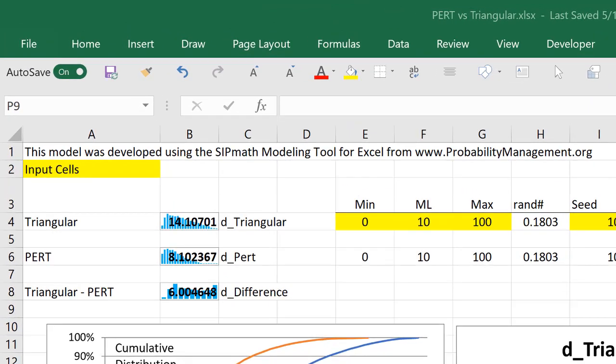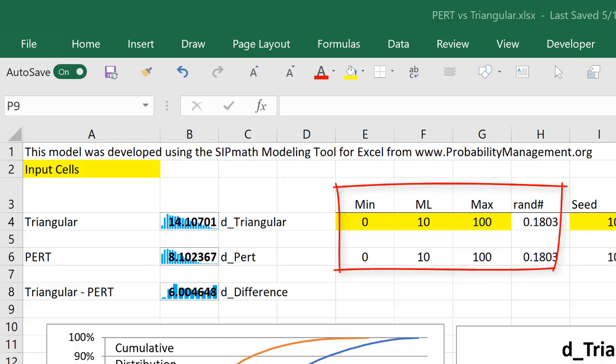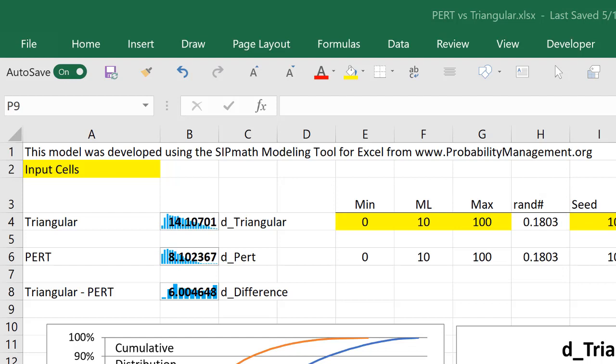Oftentimes subject matter experts will give you a minimum, a most likely and a maximum, and either a triangular or PERT distribution is utilized in the analysis. This might be in a cost and schedule risk analysis, for example.